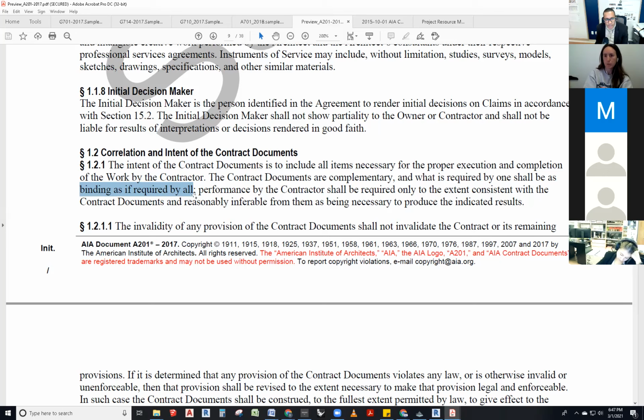That sheet is better taken out of the set than put in there if you don't want the contractor to build it. Again, the contractor, if they actually look at the drawings, is looking at them for scope of work. Everything in there is a line item that they're going to quantify, price, and put a price tag and a time tag on.